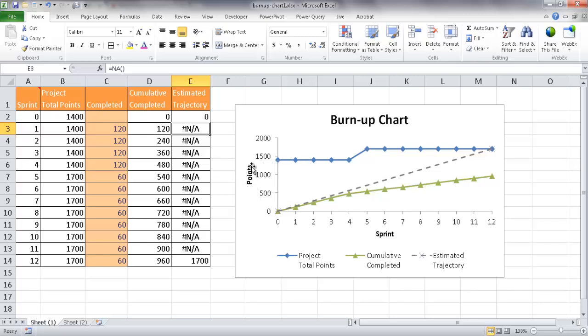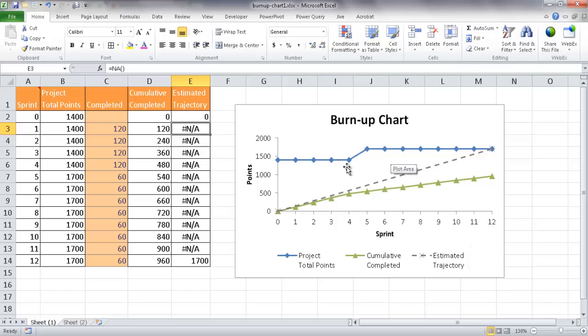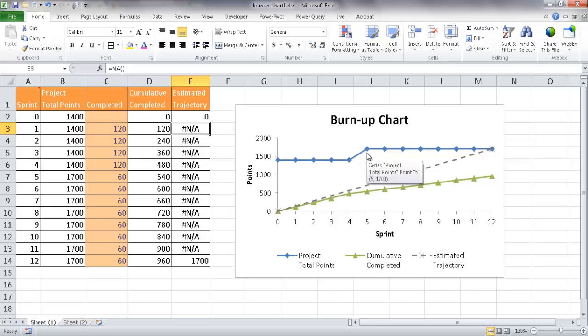But in this example, I'll just use points to kind of simplify it. So in your basic burn-up chart, you probably just have two series of data. You have your project total point, which is basically the amount of total points that the project would take to complete. You have your cumulative completed, which basically is the amount of completion for the project thus far.